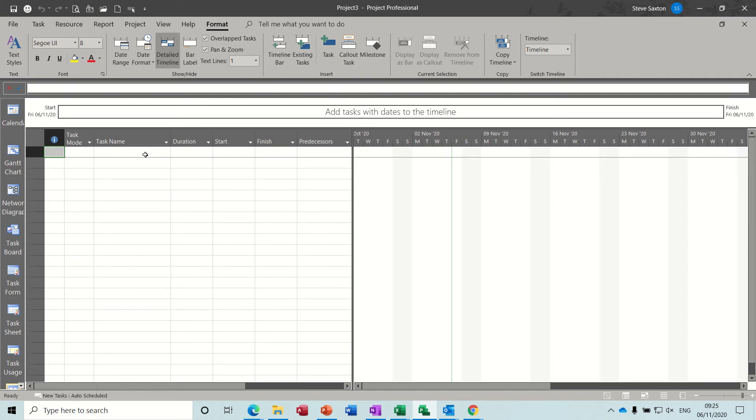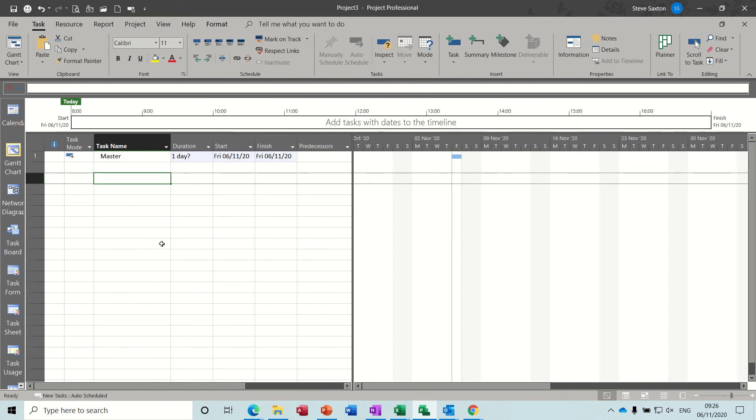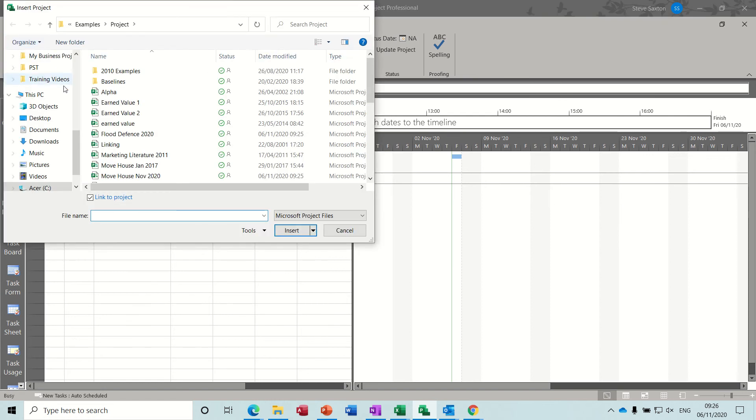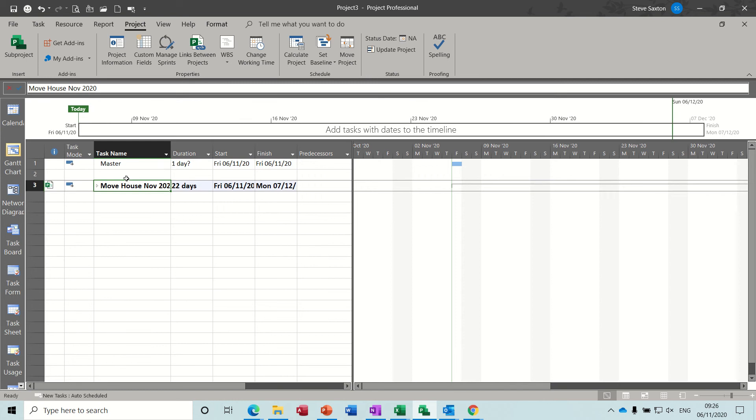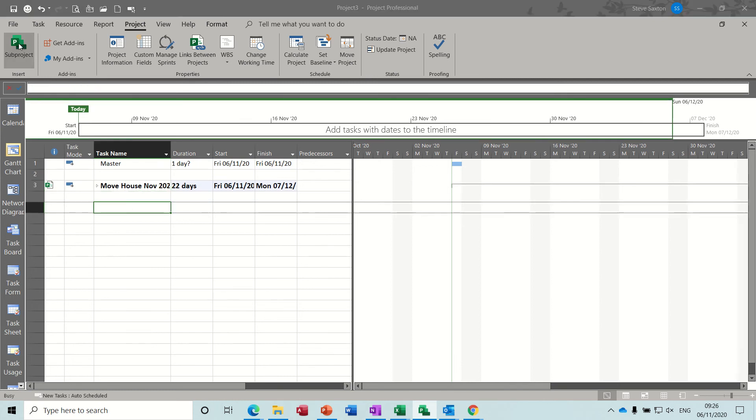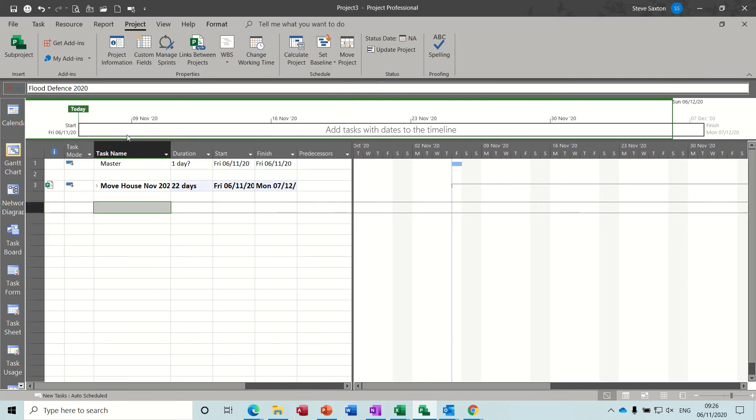So first of all in this file I want to type master at the top, leave myself a line space, go to the projects tab, click on sub project and then that gives you access to your computer. So the first one I want is move house, double click on that, leave a line space and then do the same thing again. Sub project, flood defense, like so.